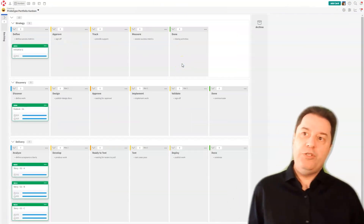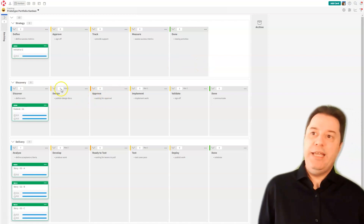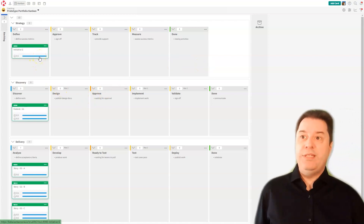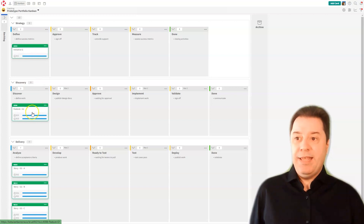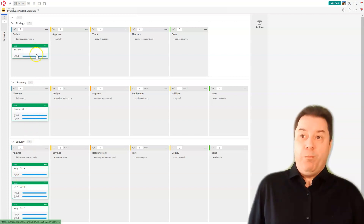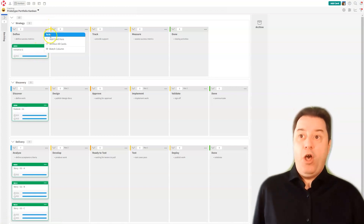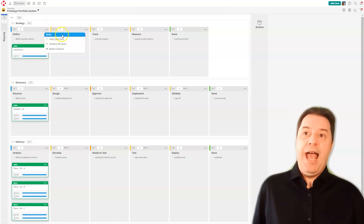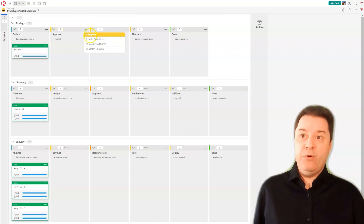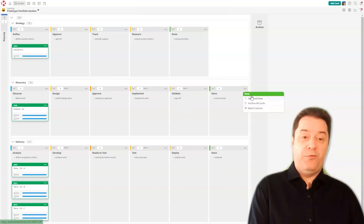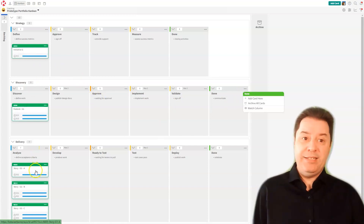Now what you want to keep an eye on are these blue bars — these are the linked cards. This one is linked to this one, and then this one is linked to the three below. The blue lines are blue because they are in a to-do blue state. As you move cards to yellow columns for in progress, orange columns for buffer or waiting, and green columns for done, you will see these lines change.